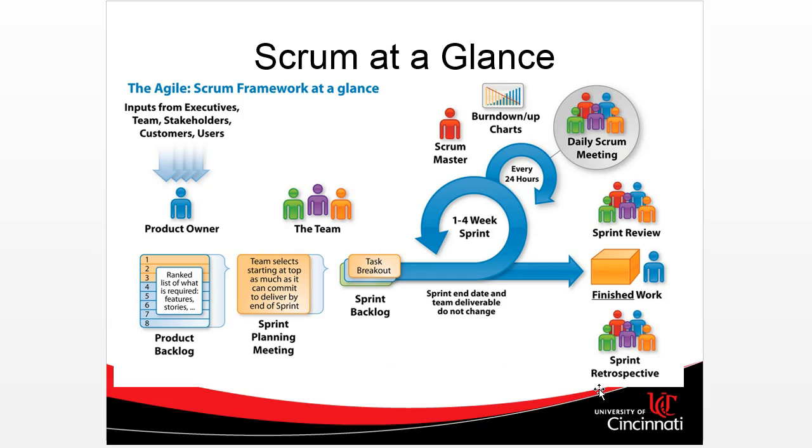Now, I don't like those terms because it tends to lead to finger pointing. And so I do stop, start, continue, which is what are we going to start doing that's going to make us more efficient? Maybe use virtual machines, maybe have a standard virtual machine. What are we going to stop doing that was inefficient? Maybe all of us working on getting our environment set up separately when there was a lot of overhead there that could have been shared. What are we going to continue doing that worked well? Maybe sitting next to each other in an open office environment where we could easily ask questions to each other.